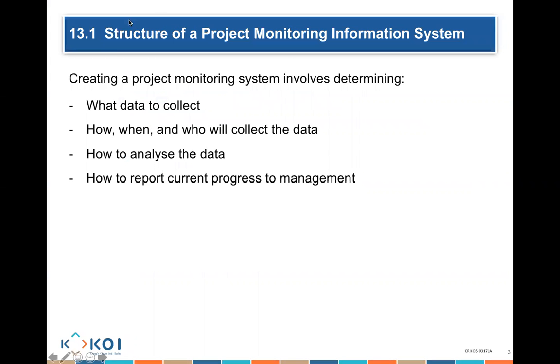Now, we're going to need to talk about a number of aspects. I'm going to start mentioning one after the other. First of all, we need to create a project monitoring system. And that project monitoring system involves a number of things: understanding what data I need to be collecting, how, when, and who will collect that data, how will the data be analyzed, and how to report the current progress.